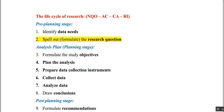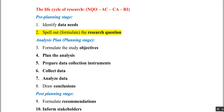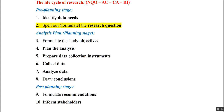Now, the lifecycle of research is divided into three stages. The first is the pre-planning stage: understanding data needs and formulating the research question. Then the planning stage: formulate study objectives, plan the analysis, prepare data collection instruments, collect data, analyze data, and draw conclusions. Finally, the post-planning stage: formulate future recommendations and inform all stakeholders of the research. The first two steps are in pre-planning, the last two are in post-planning, and the rest are in the planning stage.